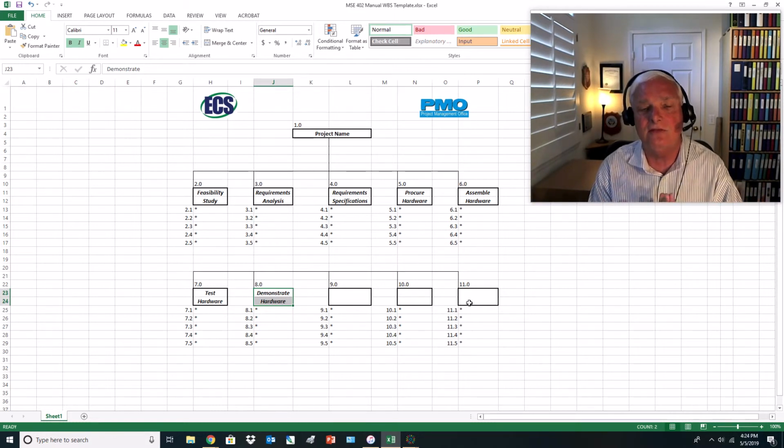You can make this document look as deep as you want, but use this as an opportunity to articulate everything out of the scope statement. From a traceability standpoint, you should be able to go to the WBS, point back to the scope statement, and say, I can find every one of those document areas in the scope statement identified over here. That flow exists. This is what we want to have ready for ourselves prior to going into Microsoft Project.